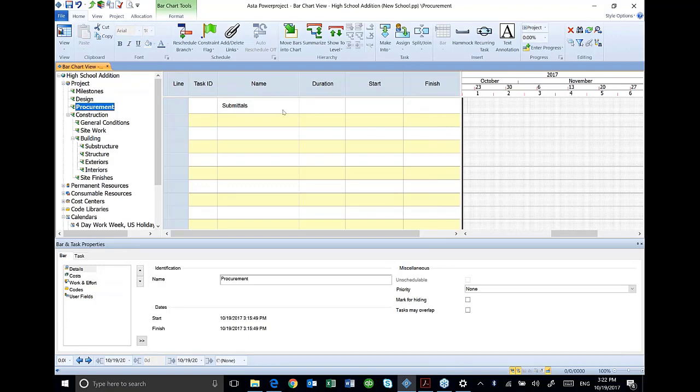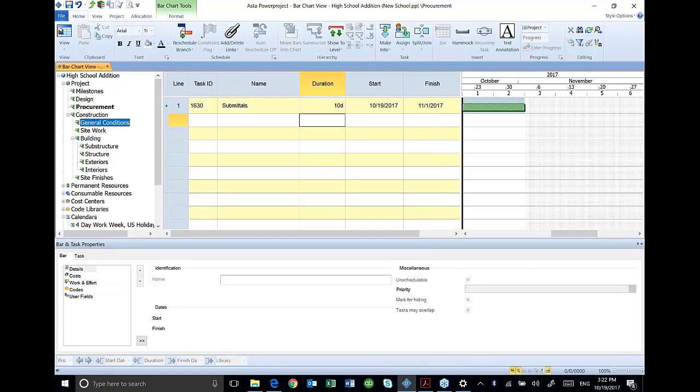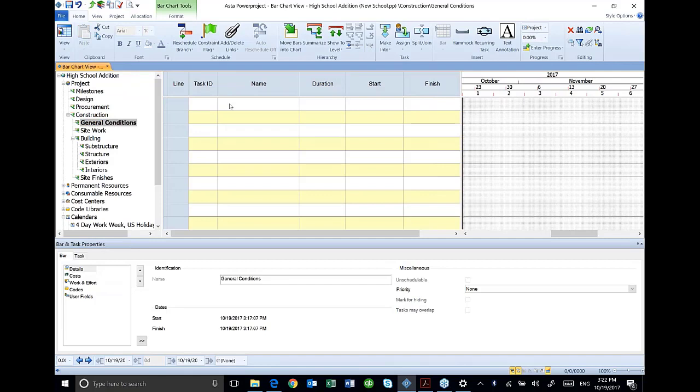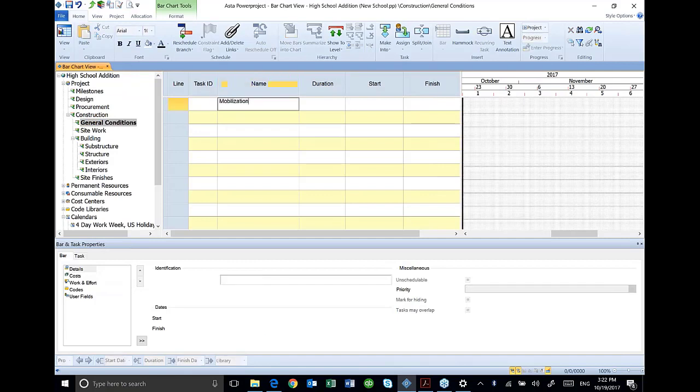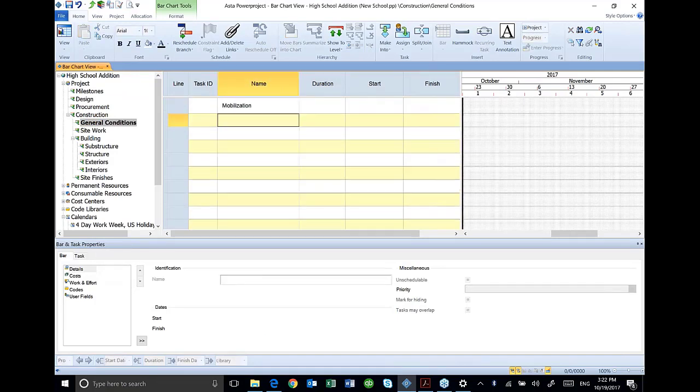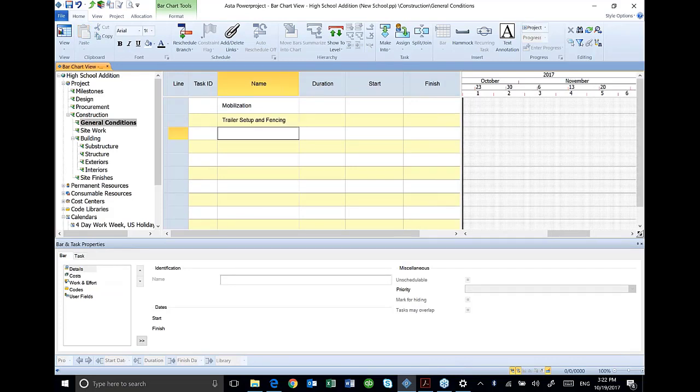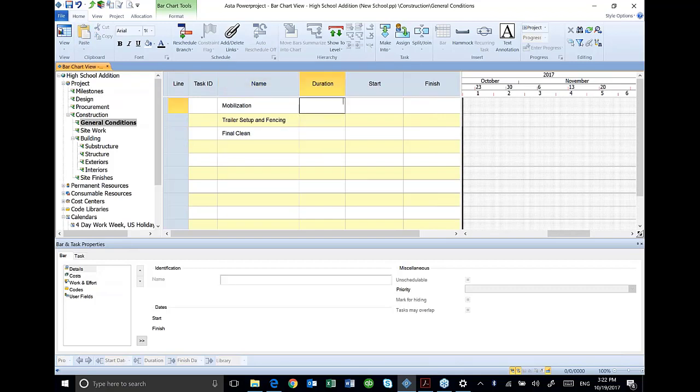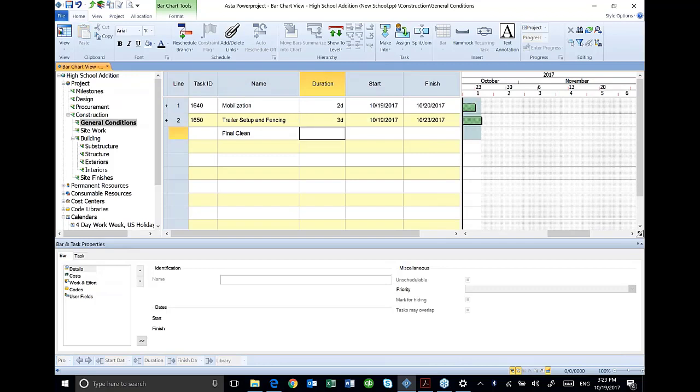So under general conditions, mobilization. I've got a trailer set up and fencing, and I've got another activity for final clean. I'm going to put my durations in there, and I put a D after it just so that ASTA knows that I'm doing days and makes things a little easier for it.